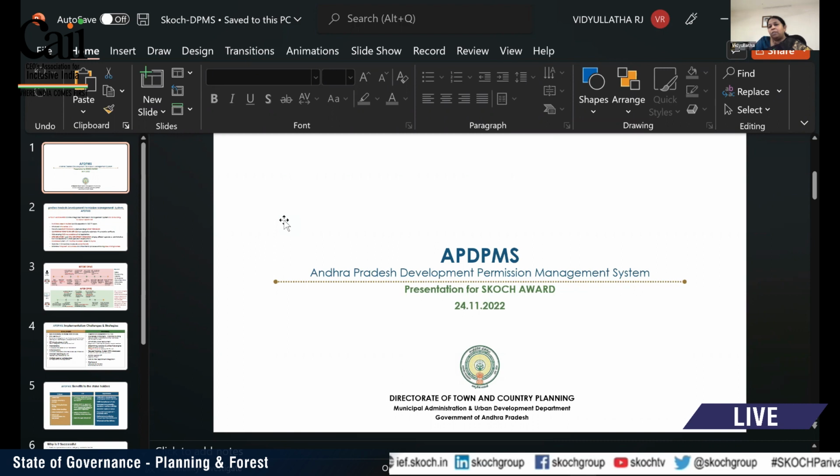So no deviations are there. And in our building rules itself, we have given the leverage of 10% deviation because of vastu or some other reasons during the construction. If any deviation is there below the 10%, we are imposing the penalty and we are giving the occupancy certificate. Like that, we are assuring that above 300 square meters, constructions are happening without deviations, sir.